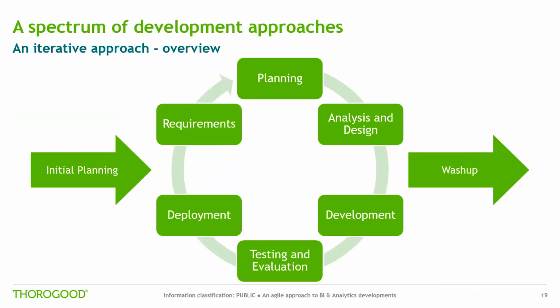An iterative approach is likely to include more frequent and smaller releases, with much less time between releases, but also much less additional content from one delivery to the next, with a focus more on building a working prototype and then continual revision through small amounts of additional functionality.